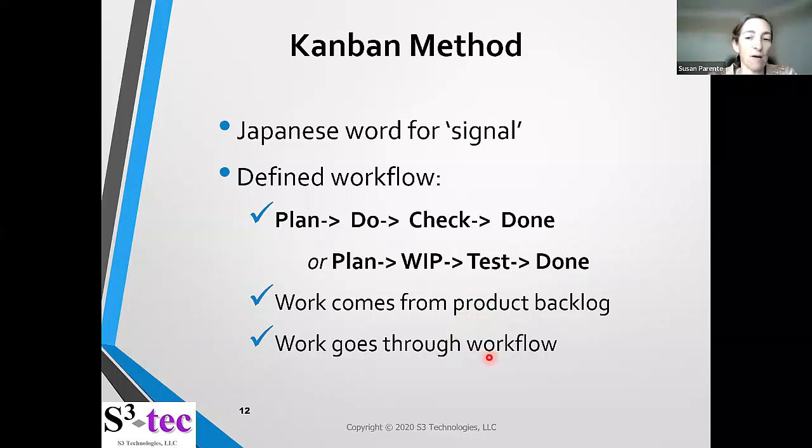The idea in Kanban is to limit the work in progress. I'm sure you're familiar with this: you're working on 10 things and you're not getting anything done. So the focus of Kanban is, okay, you have 10 things to do, prioritize them, and work on no more than 1 or 2 at once, depending on how many people are on your team, obviously. Focus on getting it done, getting it through the workflow, and then pick the next thing to do by priority. That will really help you be focused and accomplish a lot more.